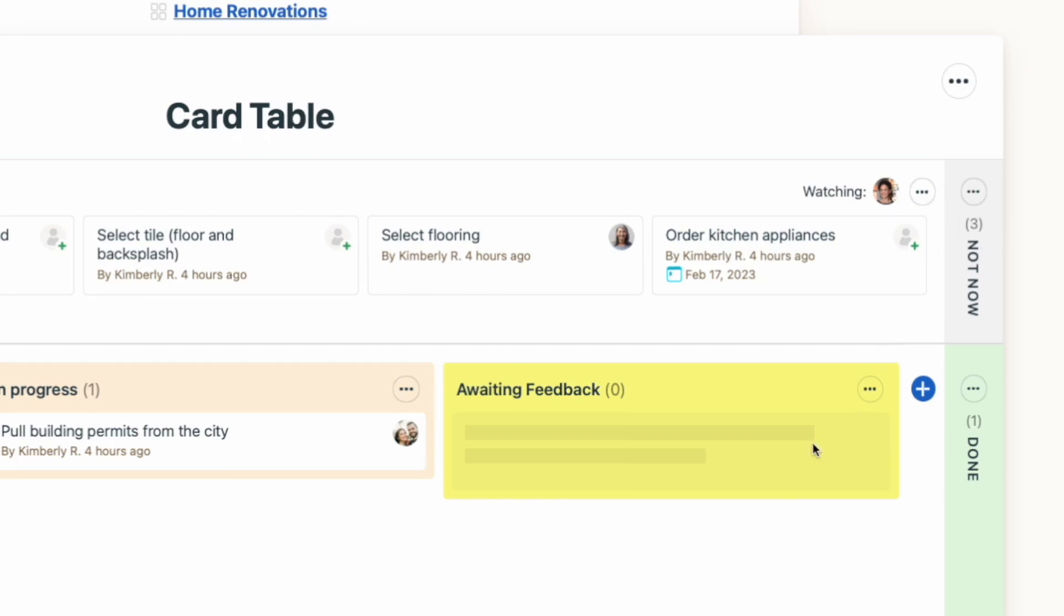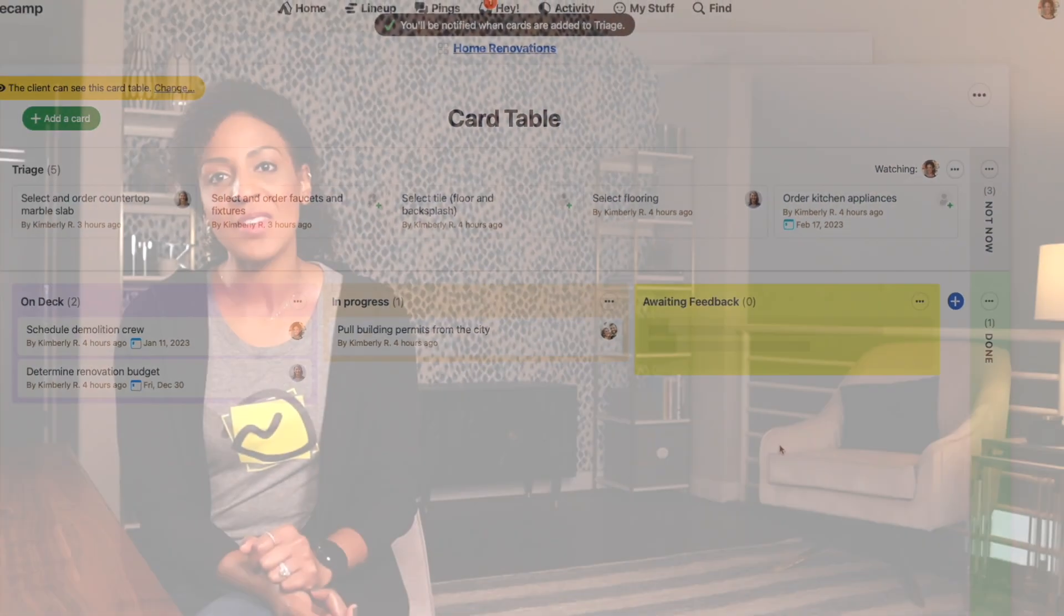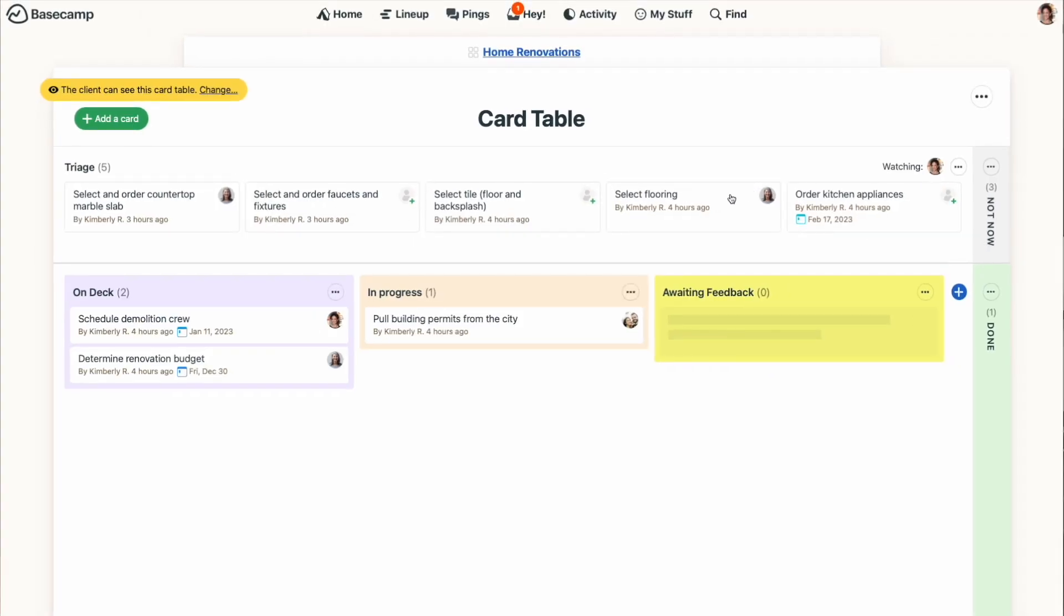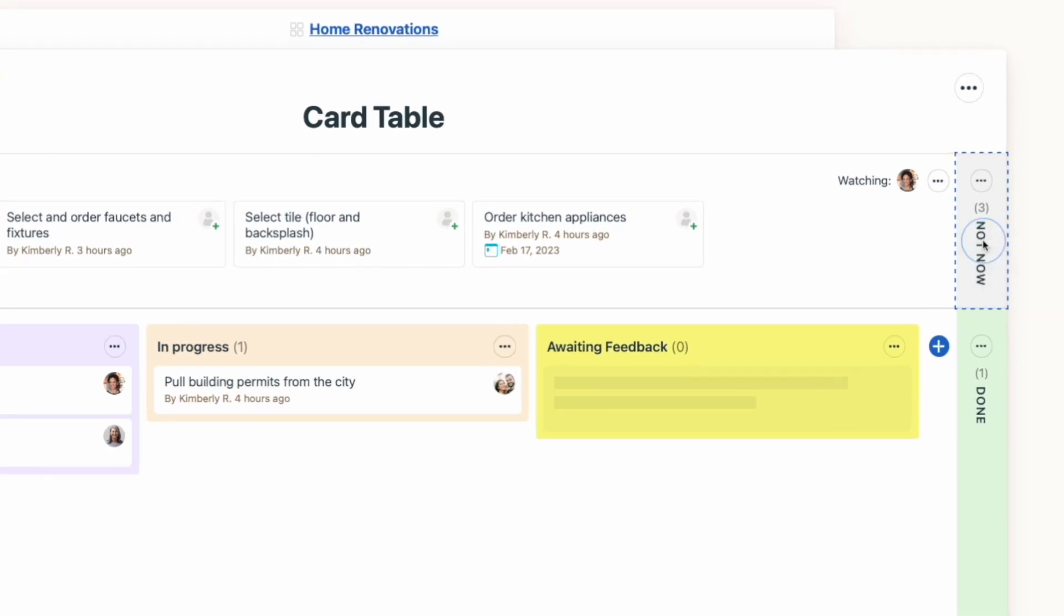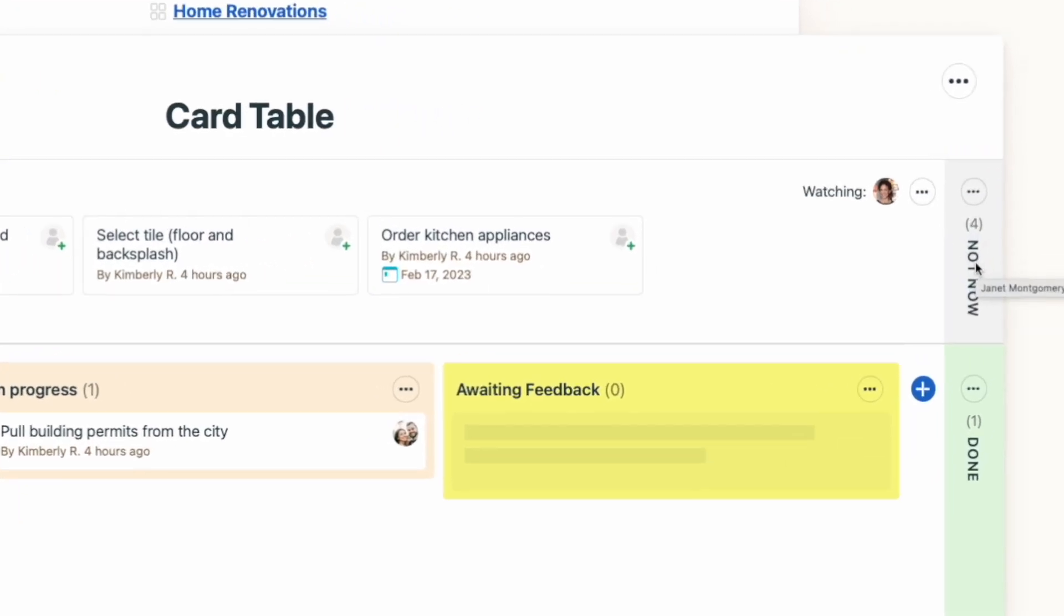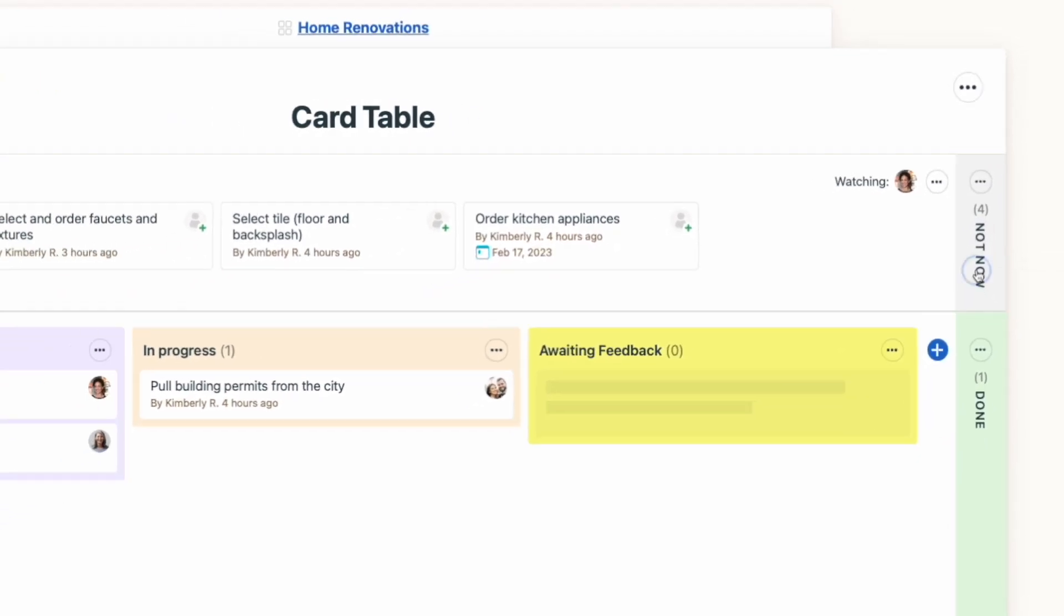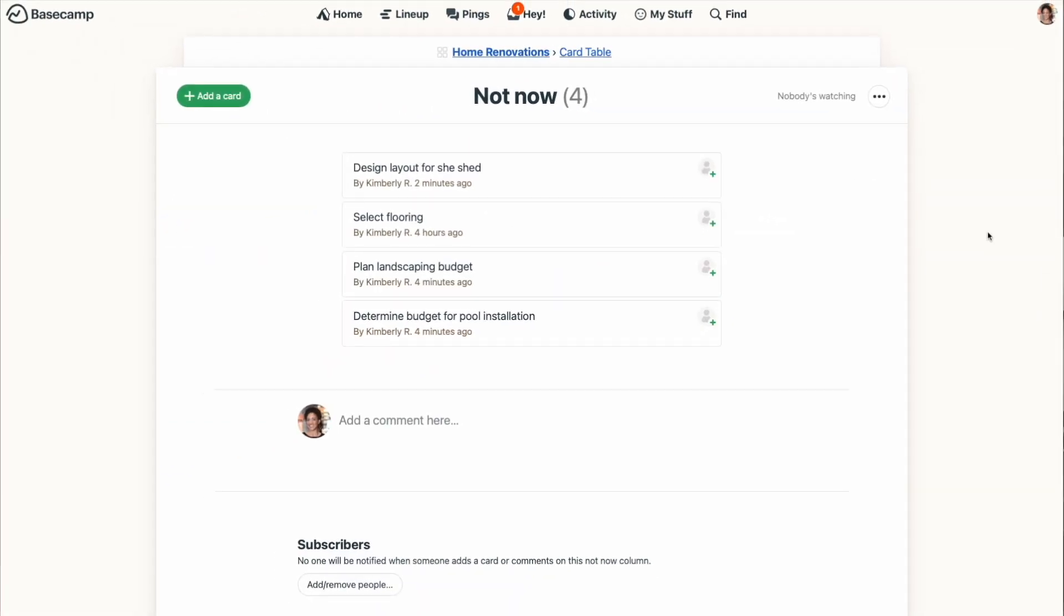Just a couple of other things I want to point out. I mentioned that Not Now section at the top earlier. You may run into a situation where an idea or task that's in the triage section isn't something that should actually be worked on, or at least not right now. Those cards can be moved to the Not Now section and they'll be safely out of sight, but not completely deleted. You can click on the Not Now header to see all the cards that are in that section.